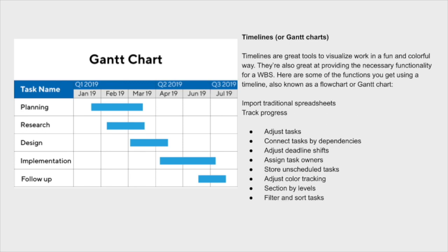Some of those can overlap, meaning that they can go on at the same time. So planning and research can both occur at the same time. You notice that one overlaps the others, whereas others need to be completed before the next one can begin. For example, design really needs to be almost wrapped up before implementation begins. So the Gantt chart is a good way to look at the overall project from a timing perspective.